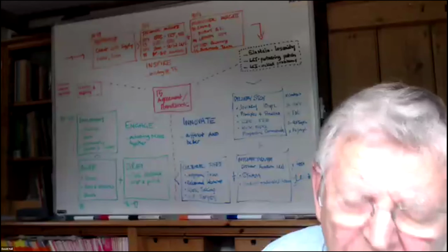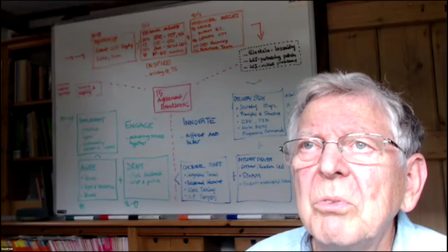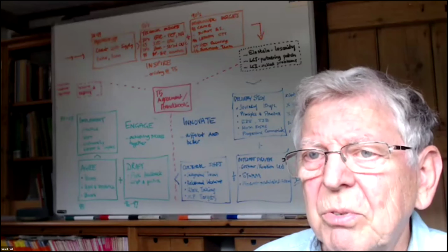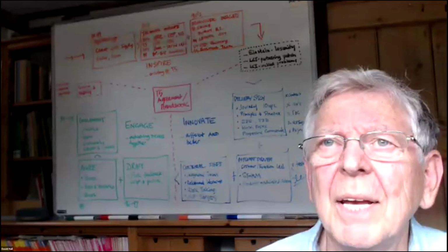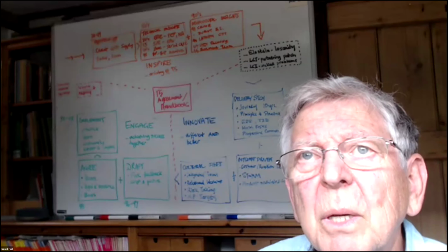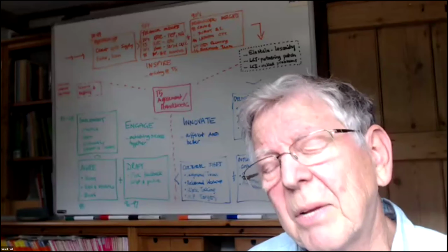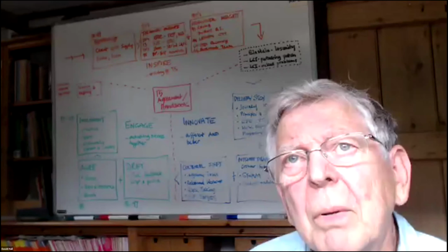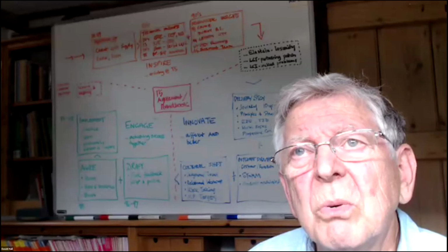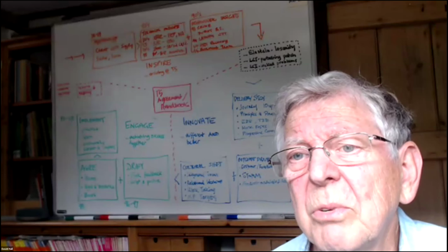And the same situation with risks. A lot of the learning that we had was that when people try and pre-think through risks and pre-assign them, they mostly get it wrong. And if you get it wrong, you pay one way or another. You either pay in time or you pay in cost, pounds and dollars, and quite often you pay both ways. And in that process, you also put people's lives at risk, and you certainly put the quality at risk.